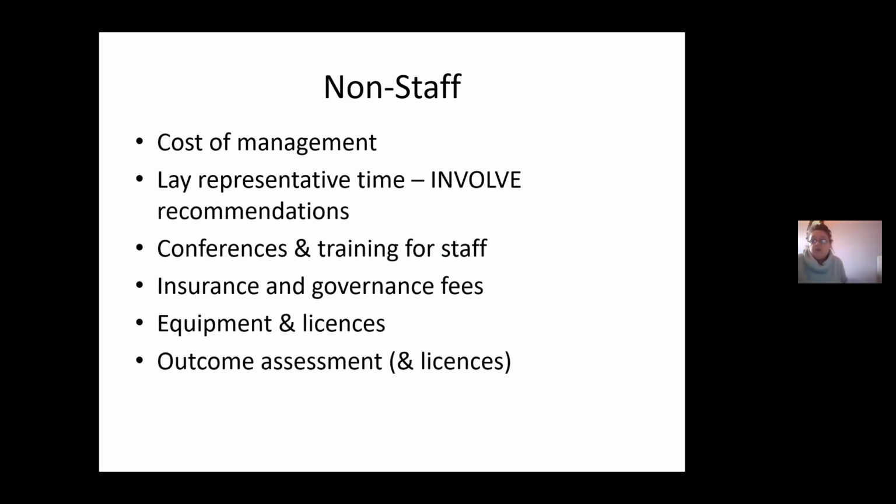Think about your non-staff costs as well. As we mentioned, RLA representatives, do you need to include for dissemination? Are there going to be conferences? What about any training of staff that might be included? Equipment and licenses, are you going to need additional equipment? And if there's any fees attached to particular use of validated measures or licenses that are required for software to allow you to do your work. So it's important to think about your non-staff costs as well.